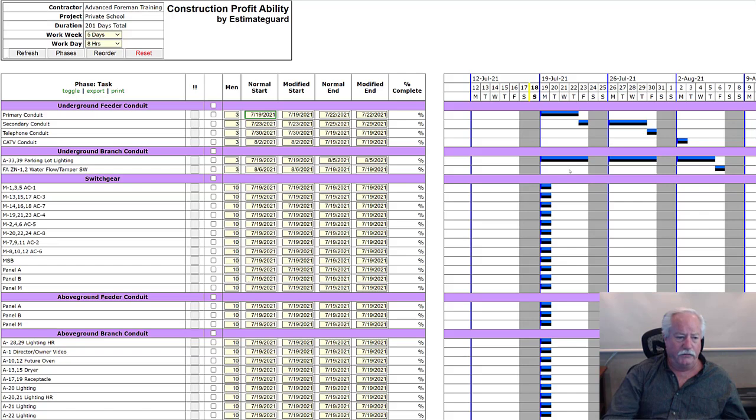Okay, now I'm going to say that, hey, we're going to go out and do some underground work and get this project kicked off. And then we're going to have to pull off of that project for a month, 30 days, while they pour a foundation and get some walls up, and that's probably optimistic, but we'll just say 30 days.